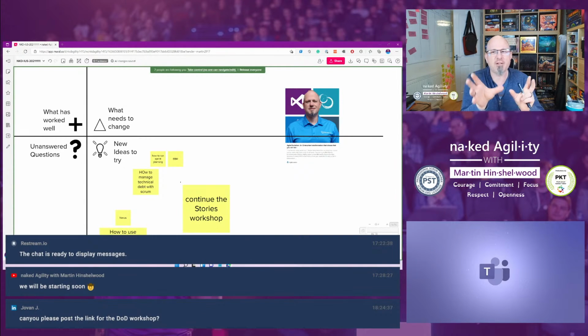They had some crazy acronym for it. But they effectively had a dual role of delivering from the SRE backlog, so the live site issues backlog, dealing with live site issues so that you protected the team so they could focus on value, and then that rotated through the team so that you didn't have one person annoyed at that.